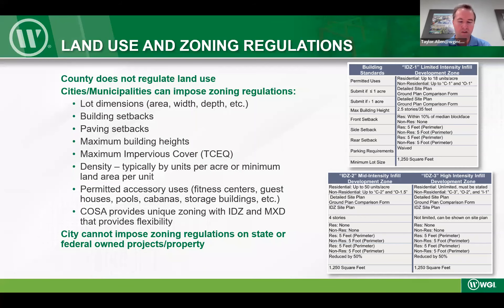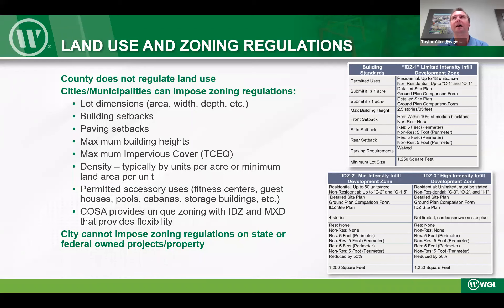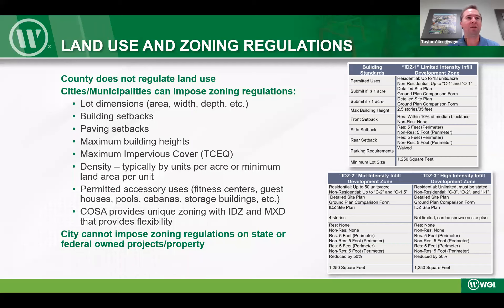The first topic is land use and zoning, implemented by the city of San Antonio — the county does not regulate this. For the vast majority of projects in the San Antonio area, your base zoning will dictate lot size requirements, setbacks, and additional buffers when abutting single-family residential or other residential uses. Zoning also dictates building heights in certain parts of the city, potential impervious cover limitations, and density on both multi-family and single-family residential.